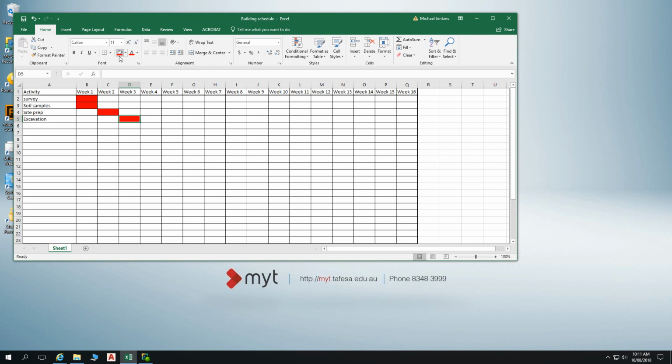Okay, so we've dug trenches and things like that. Then what's the next thing we're going to do? The plumber and the drainer come in. Yeah. So, plumbing. Anything else that's going to be happening at that time? Formwork? Yeah. So we do plumbing and then formwork close to following after. Yeah, I'm fine with that.